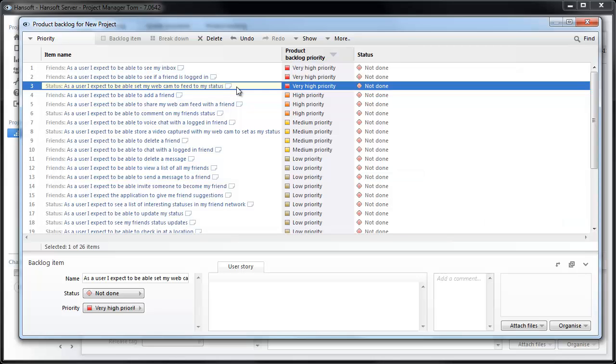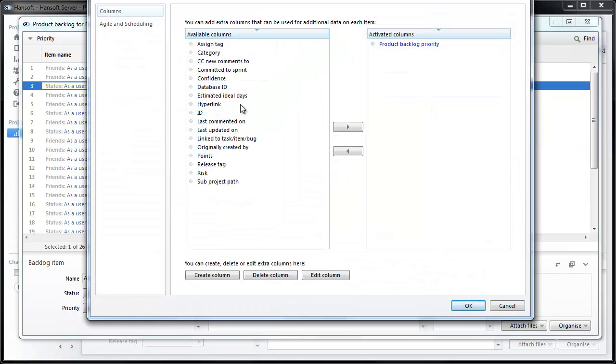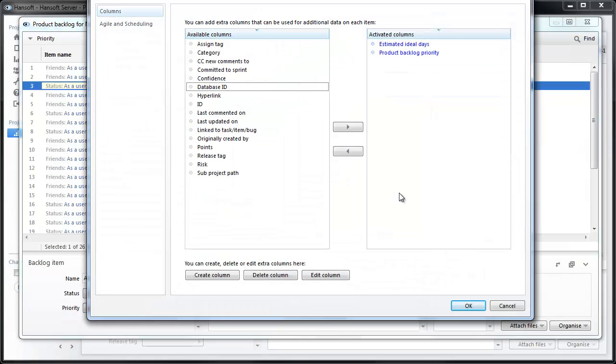For some projects this is enough. This is all you need. You need a prioritized list that you can start working off. But sometimes you want to know how fast you're moving through the project and to give you an estimate of where you will be at a certain time. For that you need to start estimating the backlog.